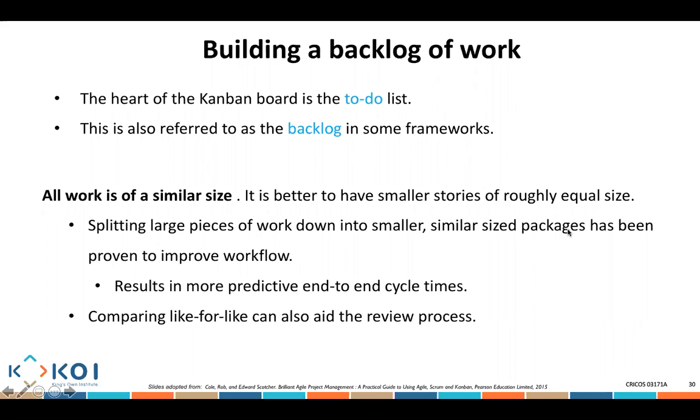Now, building a backlog of work: the heart of Kanban is a to-do list. The to-do list is your backlog. That's a list of features. All work is of similar size. That's what I spoke about earlier. It is better to have smaller stories of roughly equal size.